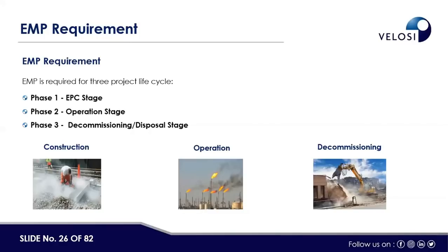EMP is required for the three project life cycle phases. One is the EPC phase, meaning the construction phase. As I mentioned, there are three kinds of EMP: construction, operation, and decommissioning. So the EMP is required at the EPC or construction stage, before the commencement of construction.